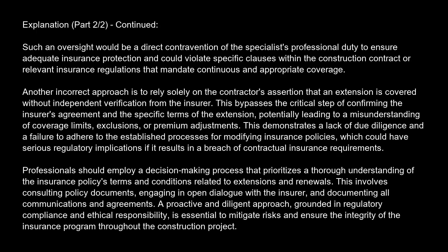Such an oversight would be a direct contravention of the specialist's professional duty to ensure adequate insurance protection, and could violate specific clauses within the construction contract or relevant insurance regulations that mandate continuous and appropriate coverage. Another incorrect approach is to rely solely on the contractor's assertion that an extension is covered without independent verification from the insurer. This bypasses the critical step of confirming the insurer's agreement and the specific terms of the extension, potentially leading to a misunderstanding of coverage limits, exclusions, or premium adjustments.